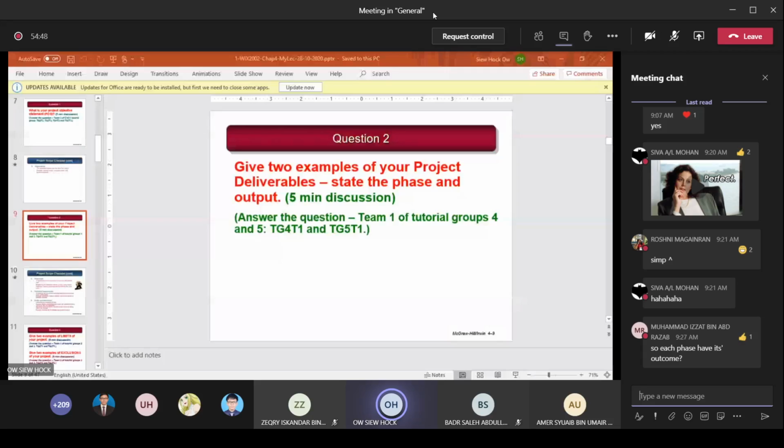Your data analysis should be the same as the answer given by the previous team. Okay, I understand. Okay, just now you mentioned the platform for the survey. So you should just say that one is choosing the platform for conducting the survey. Then the outcome should be a list of the potential platforms that you can use. You understand? That should be the deliverable. That means you have itemized a few of these. Then only later you choose one of them. So the outcome will be the list of these, and then finally you choose one out of these.